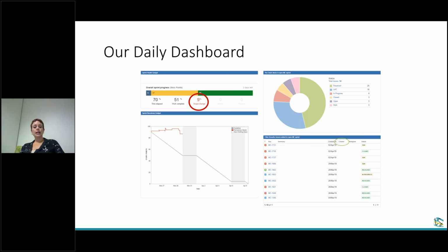The column on the left is simply two different representations of the same kind of dynamic. So the nice thing about the sprint gadget, the sprint progress gadget, I think it's called the sprint health gadget, that's up here in the upper left-hand corner, is that it shows you what's to do and what's in progress, because that burn down only goes down when a thing is flipped to a done status category. So basically your right-most column on your sprint board. So looking at that and understanding, maybe we haven't got everything flipped in the done category, but everything that's in progress is very close to being flipped.